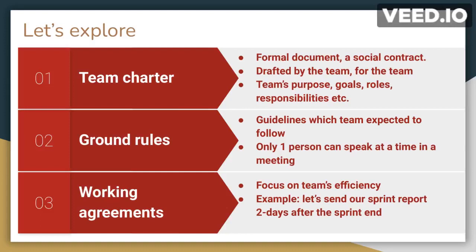For example, in a software development project, during the first half of the day instead of spending productive hours in team meetings, the team may decide to do all meetings — with the exception of the daily standup — in the second half, say after 3 PM. The first half of the day the team will spend time writing code, testing code, or other project work, focusing on the technical side and making deliverables ready. This is an example of a working agreement.